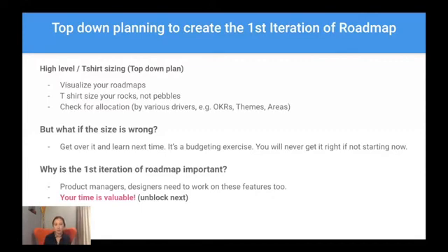In most of the portfolio management, when you've done it right, you always do the top-down, high-level understanding of the t-shirt size for your features. And this is not saying you're on the hook to deliver a feature at that t-shirt sizing. It's more of saying understanding your product team's velocity. Many of you are familiar with Scrum. So you have a Scrum team, so you have points. Over time you see what's your team's velocity, how many points you can deliver. But that's never like in day one, right? The reason of having points at a Scrum team level is just to understand what teams can accomplish over time. Same thing for t-shirt sizing.